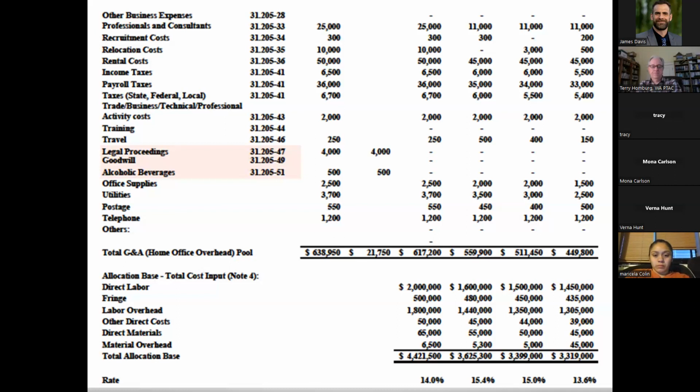Okay, so this form is something that, if you get into cost analysis and cost proposals, you need to break down, or be able to identify, what your indirects are. Directs are easy. That's your labor, your material, your equipment, and your other direct costs, say travel, things like that, for the individual jobs, individual projects, individual services. Your overheads are just the more complicated system.